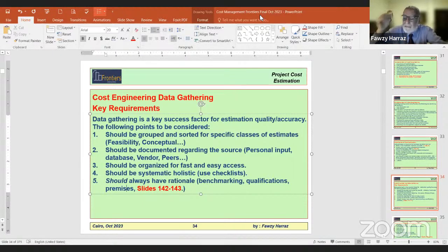What we have to do before making a recommendation to the manager is call the economics people who will evaluate the net present value, the payback, the internal rate of return, all these economic criteria, and tell them, please use $1 billion, and these are the quarterly phasing, and run your economics, and tell us what is the IRR. Normally the IRR is a very key decision.